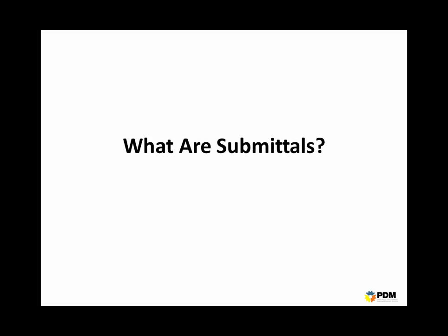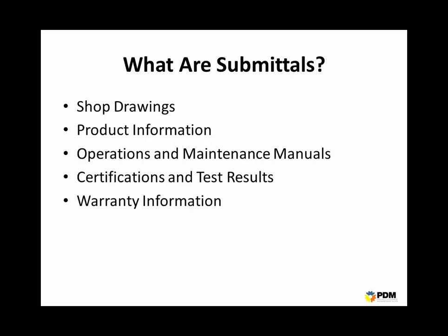During the competitive bidding process, bidders can substitute different brands of equipment or material than was specified, as long as it meets the original specifications. This allows the subcontractors to provide lower prices if they can find a more competitive product. However, the project design team must accept the substitution to assure that contractors do not use inferior or improper products.